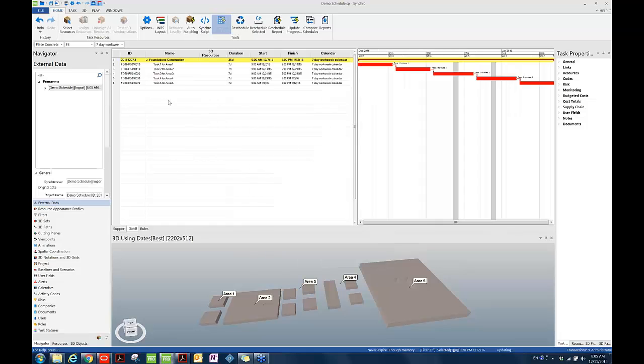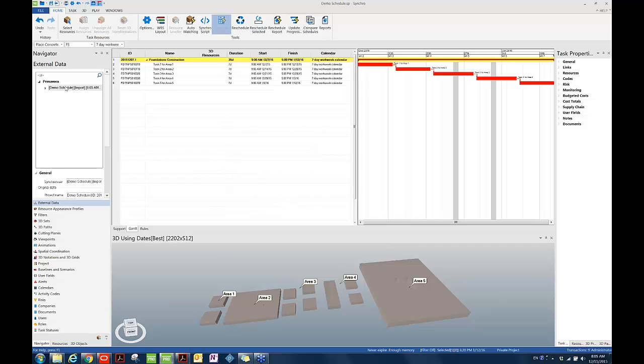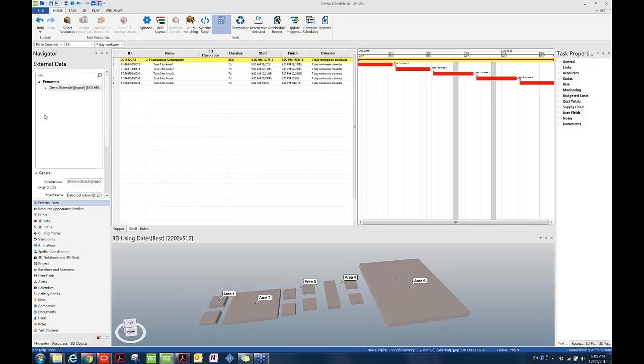Make sure the options are correct and then choose Import. After this import is successfully done, we can find a navigator, external data. Underneath Primavera, the source project, the source schedule file has been listed here. If you right-click on the file, you will be able to see Synchronize From is no longer grayed out. Synchronize From feature can be used because data exchange has happened between Synchro and the P6 XML file provided by the P6 scheduler.